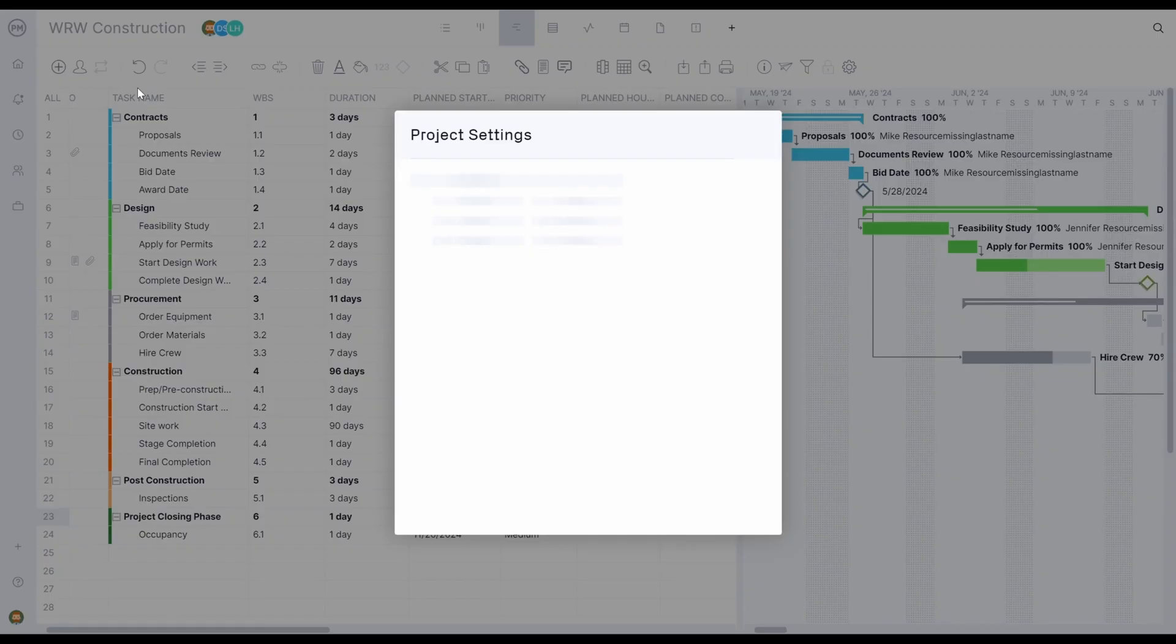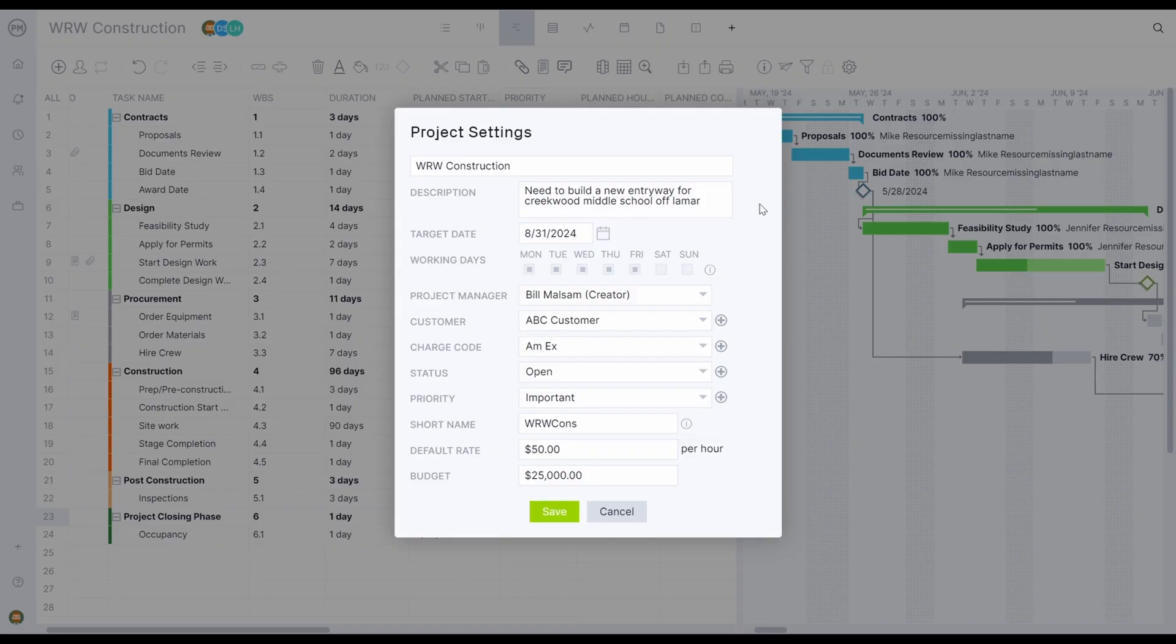Project Manager provides the fields you need to get projects organized and set up for success. Each project has a name, description, target date, working days, project manager, customer, charge code, status, priority, default labor rate, and budget.